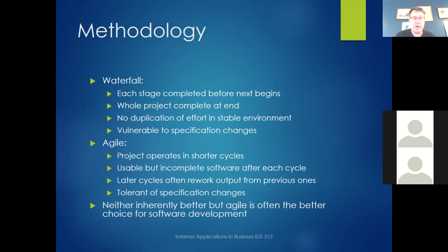However, this is obviously very vulnerable to specification changes, right? So if midway through the coding stage, you say, our guys who are doing the planning, they missed this very important feature that needs to be included. So we need to go back and rework that and see how that's going to do and see if it's going to have impact on other aspects of this project. So then you go back and do some more planning, then you come back and do the coding. That sort of thing can happen multiple times.